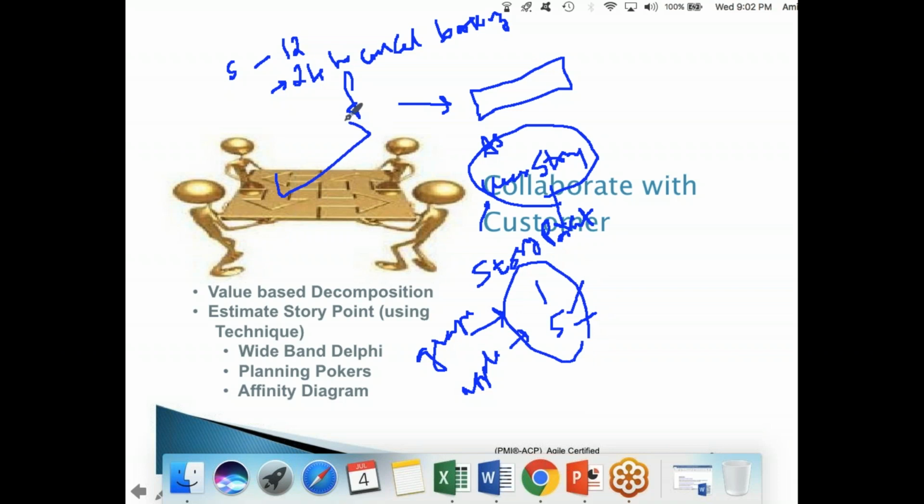If creating a close button is 1, normally you have a close button: the moment you click it, the window will be closed. What is creating a cancel booking button? Right? It could be 12 or it could be 9. You can mention it relatively.